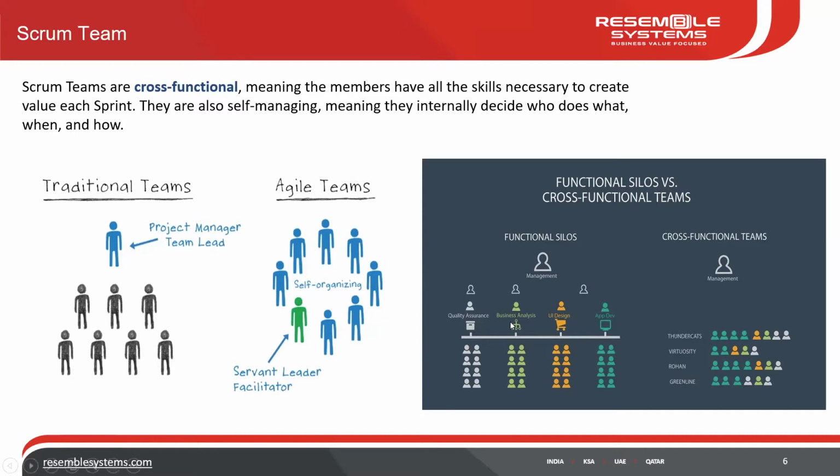So if you look at the picture on the right, in functional roles we have the same thing that I told you: different business analysis departments and people report there. But in cross-functional teams or in Agile teams, we form different teams, right? For example, Agile team 1. Here it says 4 developers, 1 UI designer, and two quality analysts, and we name these teams within the company. Then these people are put into different projects. So this is the main thing of Scrum: a self-sufficient cross-functional team which will deliver the product.